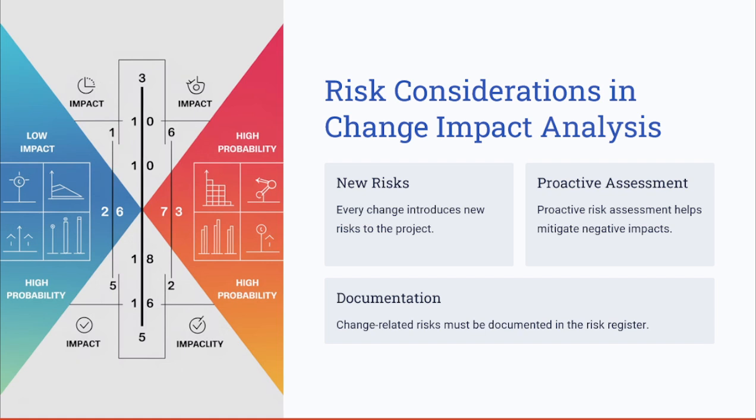For example, in a banking software upgrade, adding real-time fraud detection could introduce technical risks such as system performance issues, also operational risks such as staff requiring extra training, and also regulatory risks when it comes to compliance with the new laws. So, assessing and mitigating these risks early prevents unexpected project failures.